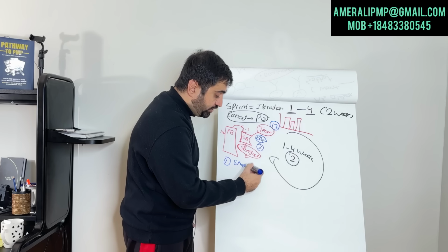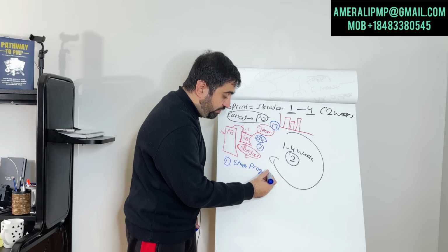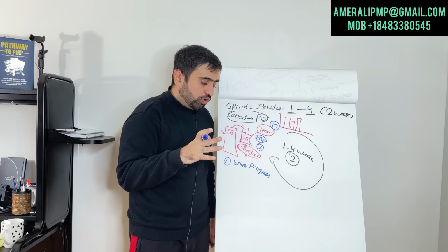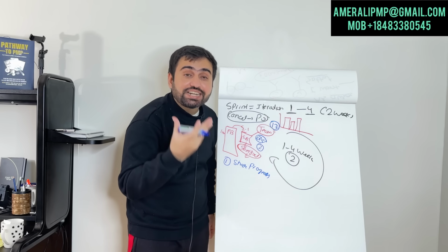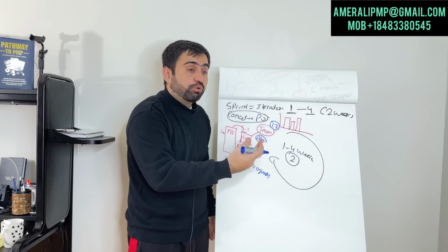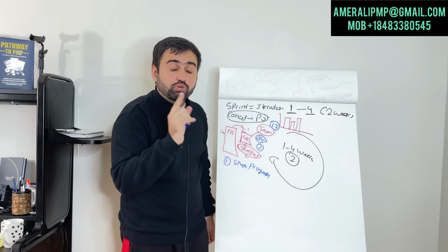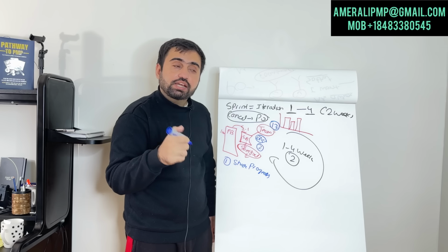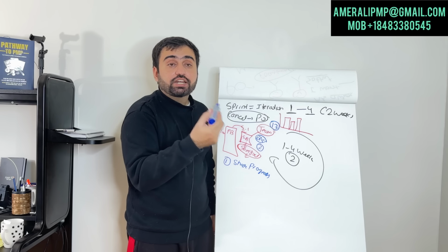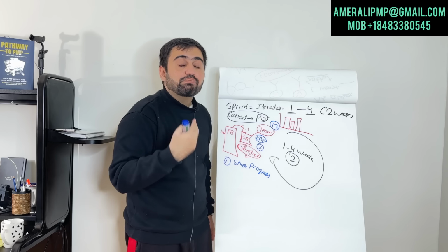We have 3 questions in it. What have you done yesterday, what are you going to do today, is there any roadblock or impediment, something that is stopping you? How can we help each other? We are sharing progress. We discuss issues, but we don't solve issues in it. If somebody wants to have a one-to-one discussion with other members, they can do it later. It is for the team, by the team.